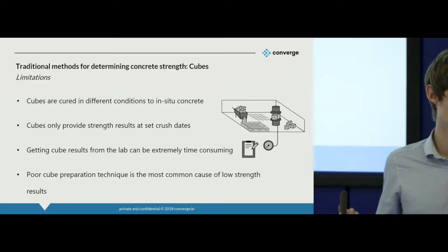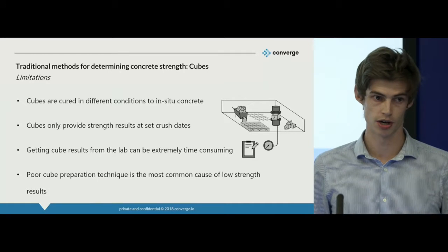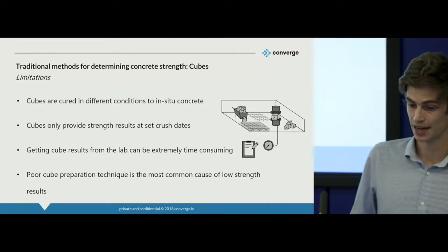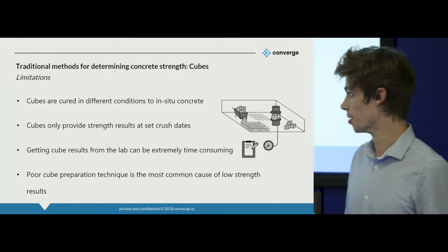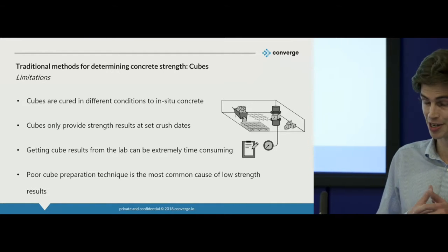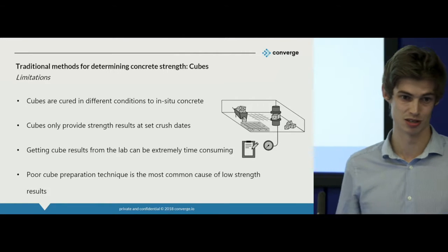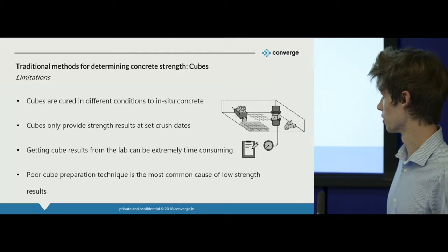We're dealing primarily at the moment with the determination of strength of concrete. So this is compressive strength of concrete. Wherever concrete's on the critical pathway of a construction job, that's obviously going to be one of the primary causes of delays. We see this quite a lot, some of the metrics that we've been through already with the industry being behind on growth and always delivering over budget. There are some consistent issues we're seeing come through here. A lot of this can relate to delays as a result of concrete strength.